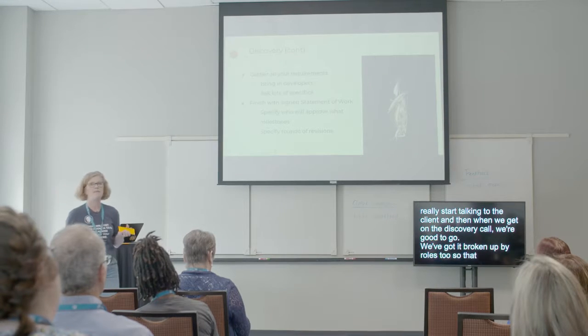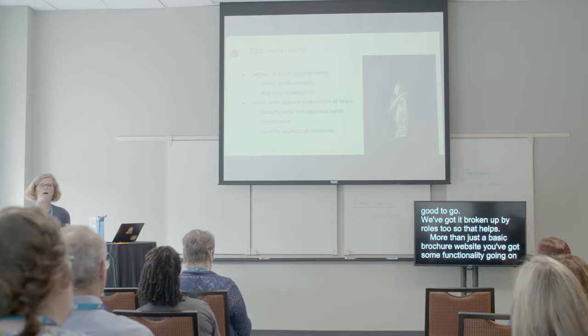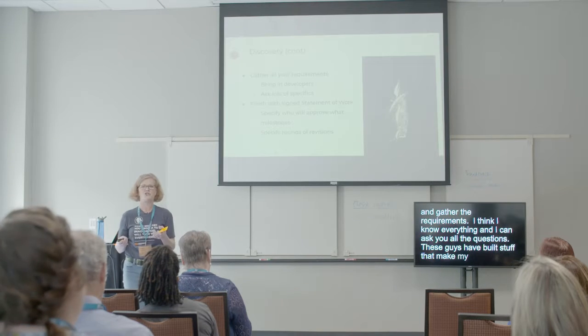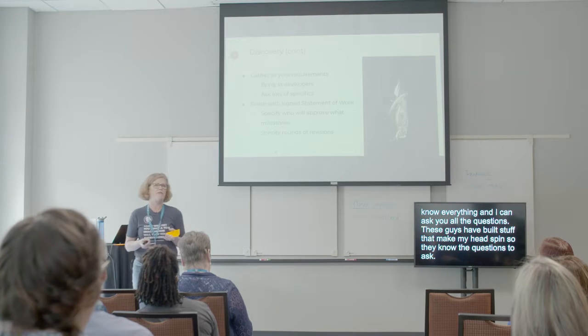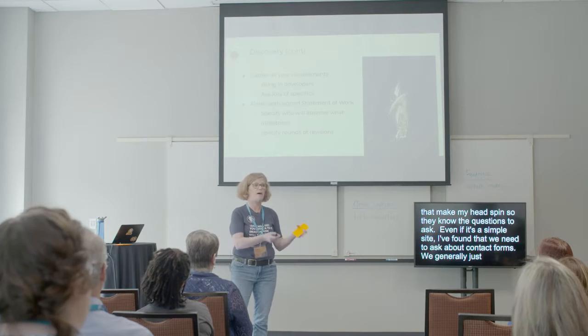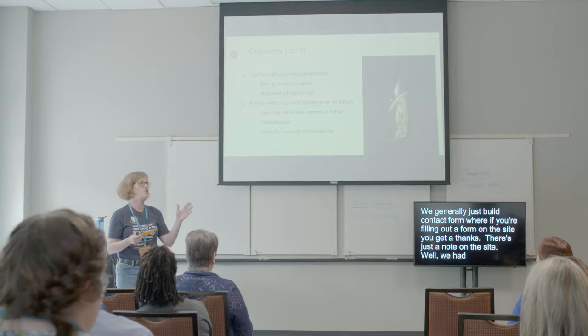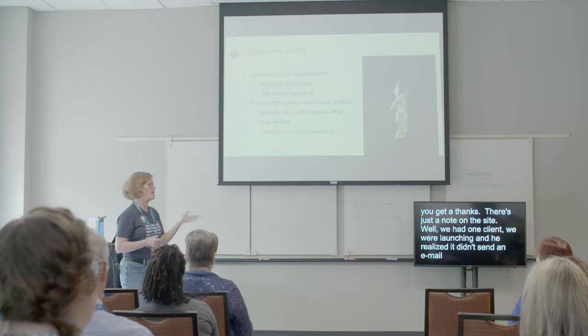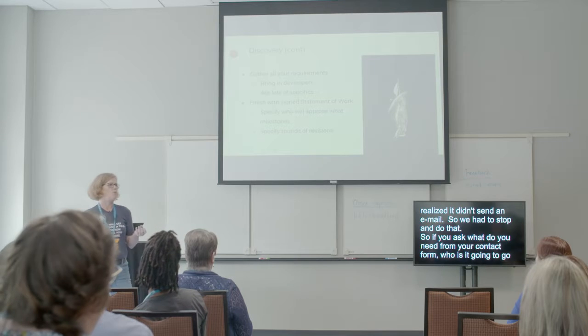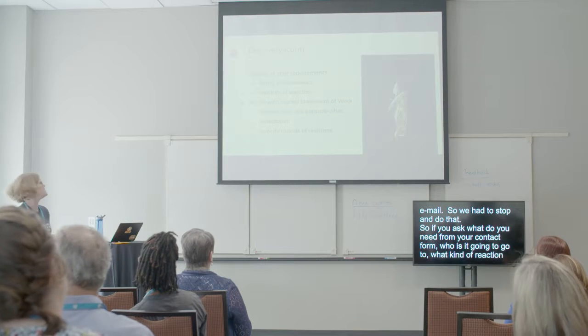So if you've got something more than just a basic brochure website, and you've got some functionality going on, I bring my developers in to gather the requirements. I think I know everything, and I can ask you all the questions. These guys have built stuff that make my head spin. So they know the questions to ask. But even if it's a simple site, I have found that we need to ask about contact forms. We generally just build a contact form where if you're filling out a form on the site, you get a thanks. Well, we had one client. We were launching, and he realized that it didn't send an email. And so we had to stop and do that. So if you ask, what do you need from your contact form? Where is it? Who is it going to go to? What kind of reaction do you want from your client? So just get really specific. Less will come up and bite you later on.